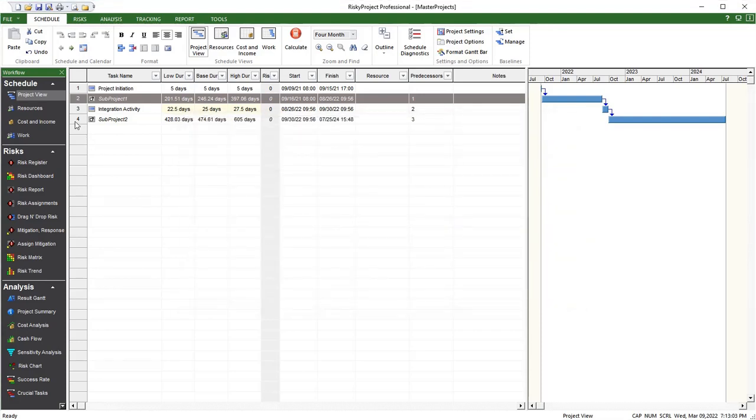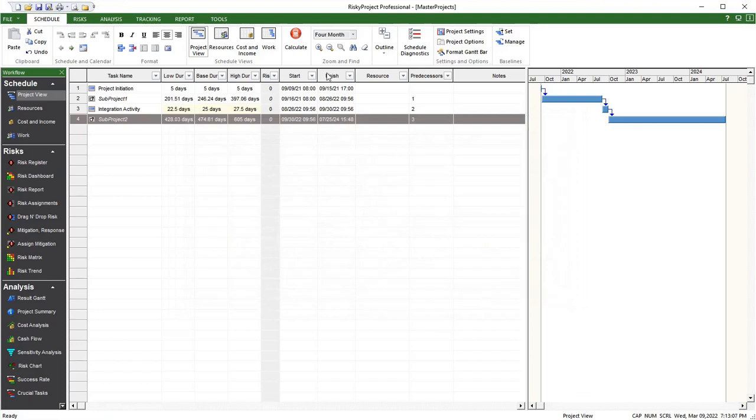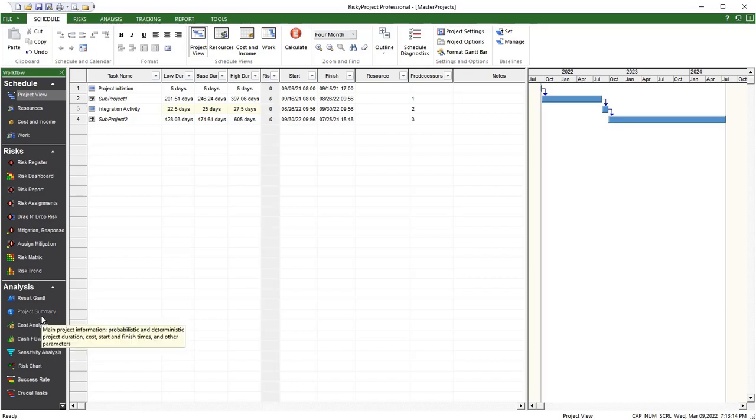This process allows you to run simulations on subprojects and use these analysis as part of a larger summary project. This can significantly reduce the effort required to analyze large programs.